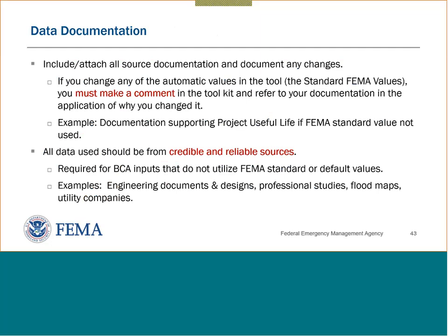All right, we've been talking about documentation. Attach all your source documentation, and if you make any changes, make sure you document that. Again, a good place to put some explanatory information is in the comment section. Please do that. If you change any of the automatic values, you have to tell us why in the toolkit and refer to the documentation that you're using.